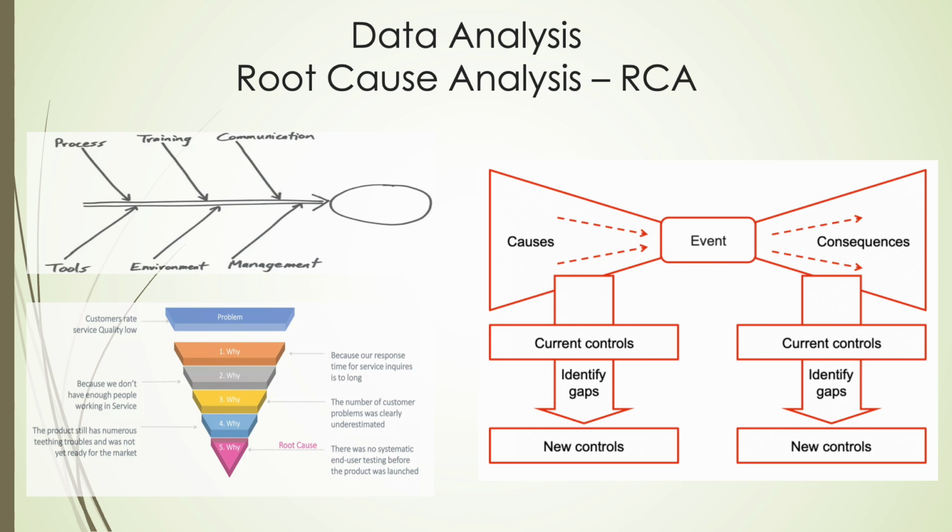Draw the diagram, connect each cause to its respective category, that is the bones of the fish, creating a visual representation of the problem's possible causes. When to use: best in a team setting, especially when multiple factors or team members are involved in the problem. Ideal for problems with multiple potential causes and when a thorough analysis is needed.